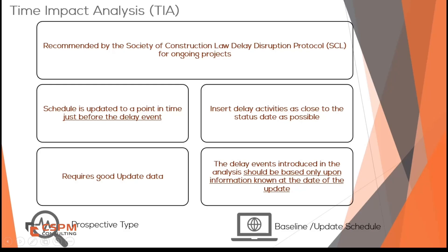However, with Time Impact Analysis, you would take the most recent update and insert the delay event right before it occurs. This allows you to see exactly how the delay will affect the project timeline based on the most recent information available, making TIA the most accurate tool for analyzing delays, especially in ongoing complex projects.